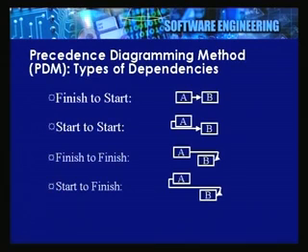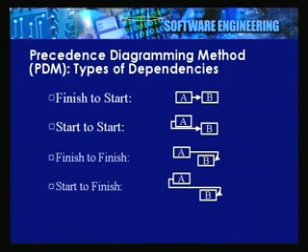The second type of relationships that we have is start to start relationships. What start to start relationship basically means, is that the two tasks A and B, the preceding task A and the succeeding task B, must start at the same time. Okay. So, if you are planning for a physical implementation of a network and determining an IP address of the configuration, both these things can, to some extent start simultaneously. Okay. So, when many tasks must start simultaneously, then we have a start to start relationship.